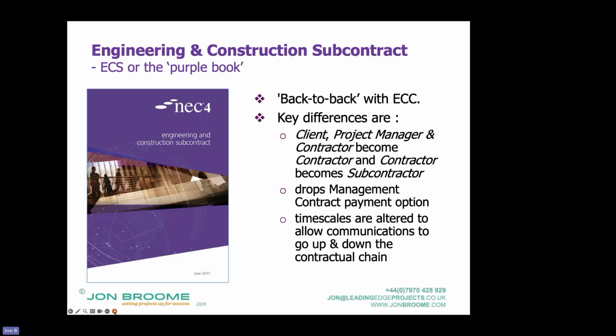Okay. So going back to this, the key differences which make it back to back. It is the same, except for the people who represent the client. So the client, the project manager, and the contractor become the contractor, and the contractor becomes the subcontractor. So everybody moves down a line. It drops the management contract payment option. So there's no option F because you don't subcontract management contracts. And the timescales are altered to allow communications to go down the line.